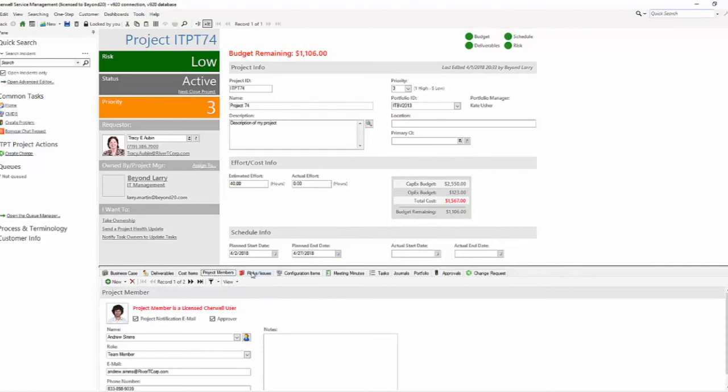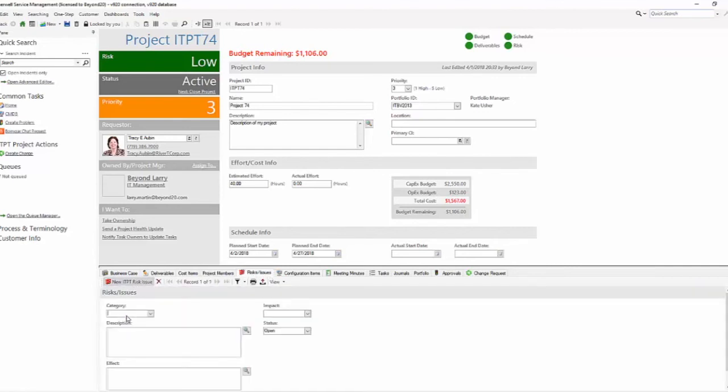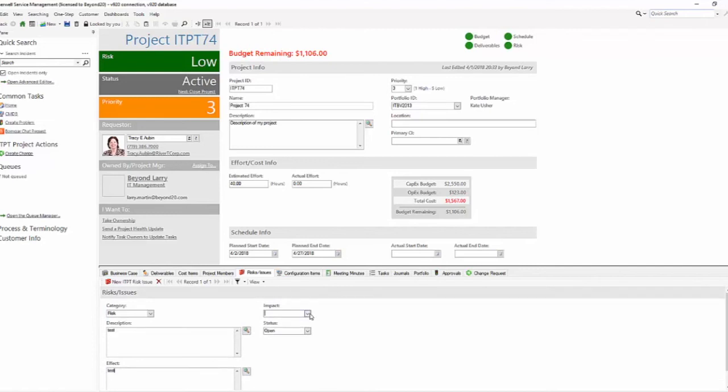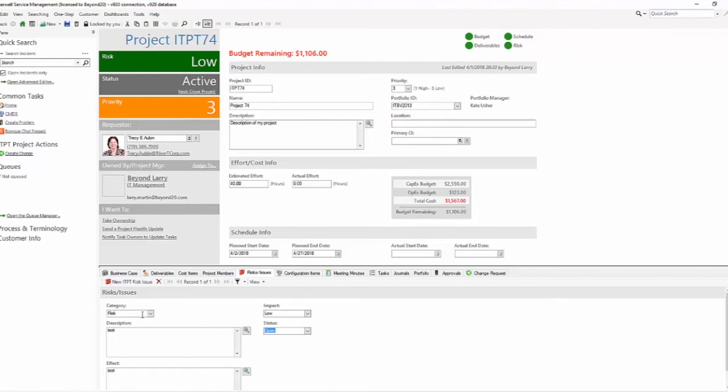Having this cost type, I would actually modify and add a blueprint to modify this grid to reflect this cost type information here so that at a glance you can start seeing more details. We've looked at the project members. Risks and issues, we can add risks or issues, decide whether it's a risk or an issue, what the description is, what the effect of that is, and then our impact. Is it low, medium or high? And then what's the status of them? So as you correct any risks or mitigate them or issues, you can actually close those out. This is where I would have calculation going for my project risk to show if I have X number of open risks or issues that over time a certain number of those, an aggregate of say five open items, takes the risk to a medium level or maybe five open items takes the risk high.